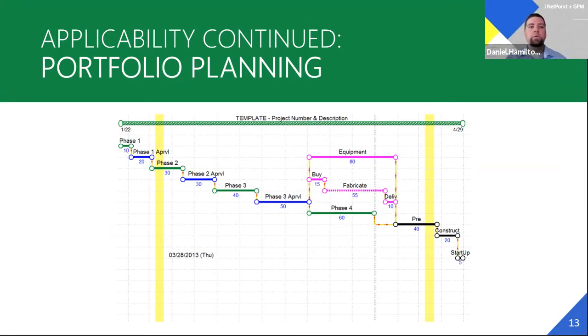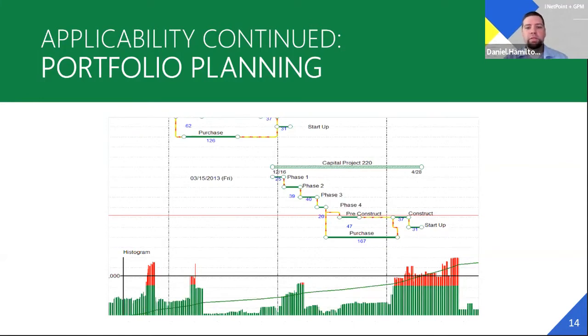All right, so this is the actual NetPoint schedule. If you take that template in the previous slide and you add each activity in NetPoint to represent a phase, including approvals, we take this and we load those dollars that the template distributed, with the dollars or hours or both, into each one of these activities. And then this actually will give us a histogram in NetPoint.